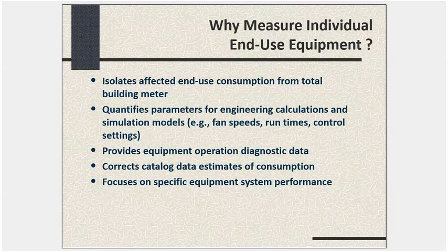One thing that comes to mind is, let's say you have a pretty large construction project that affects utility usage. Yeah, that can skew the baseline quite a bit, or the measure. Absolutely, it can, and you need to get as good information as you can about what's going on with that project, especially the time when it went on and what loads it might have imposed on the meter, to normalize any comparisons to the extent you're using a revenue meter for comparisons. But yeah, that's a good point.